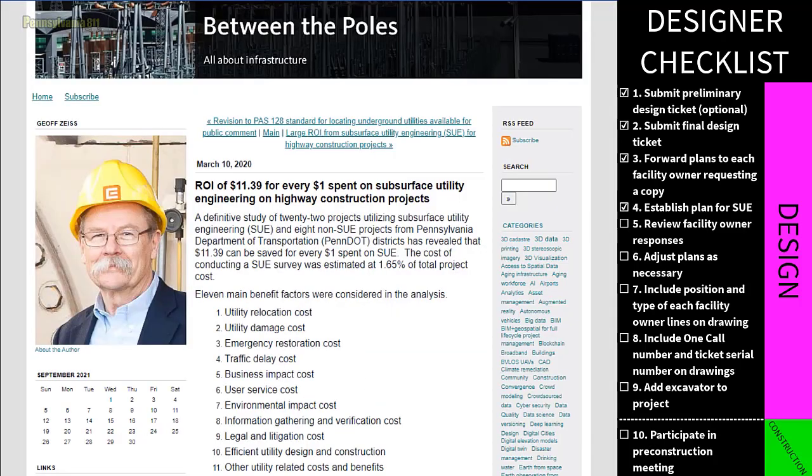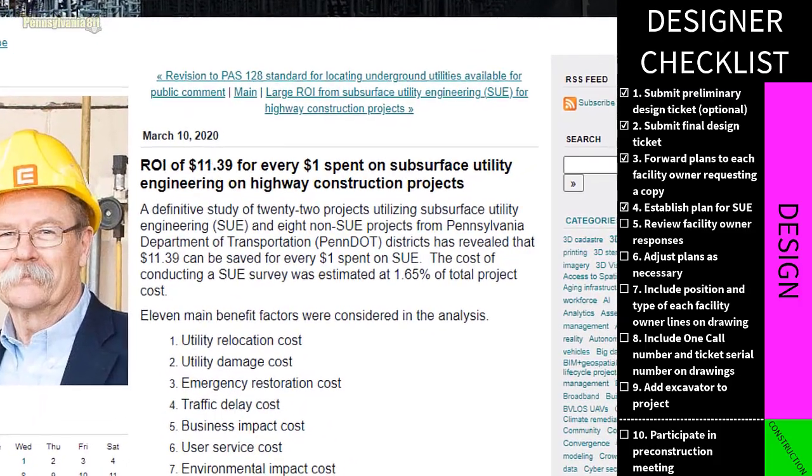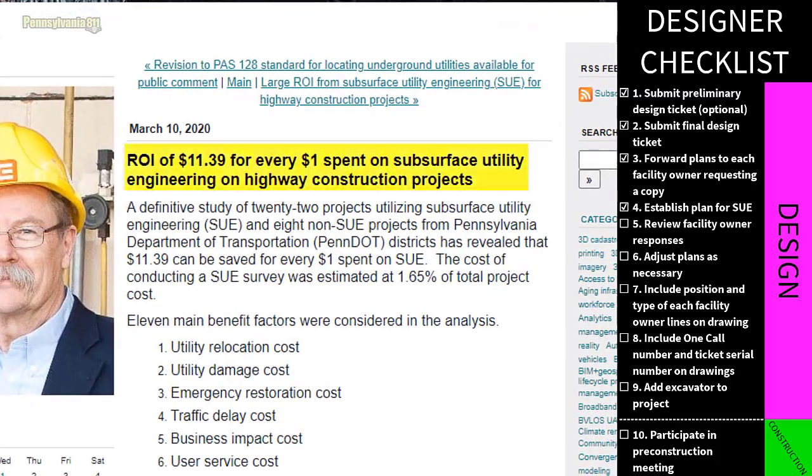In fact, a 2020 PennDOT study found that for every $1 spent on SUE, they saw a return on investment of $11.39. So regardless of the size and complexity of your project, SUE can be your best friend in controlling costs.